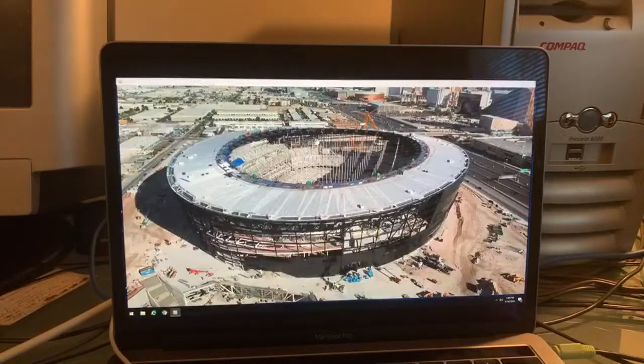this ETFE roof. As the stainless steel cabling grid was being hoisted into place and attached to the circumferential compression ring formed by the steel canopy roof, one of the connections was overstressed and resulted in a handful of bolts holding one of the more than 100 joints in the lower portion of that canopy to break. Bear in mind that we are talking about literally a handful of bolts in a structure which has more than 500,000 similar bolts. No one was injured, and the structure was never in jeopardy of failure.